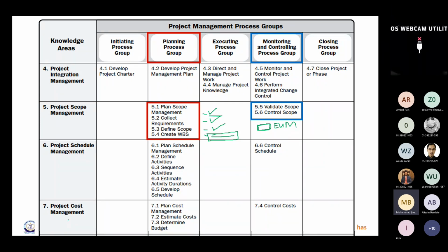Whenever you study something about project management or in general, try to visualize things, right? Look, we just revised that the scope baseline contains a scope statement, a WBS, and a WBS dictionary. What does it tell you? What is a baseline? It is the approved version of anything. If it is about scope, it is the approved version of the scope. So this would contain all of the scope, and this scope would act as a reference for execution as well as for monitoring and controlling our performance.